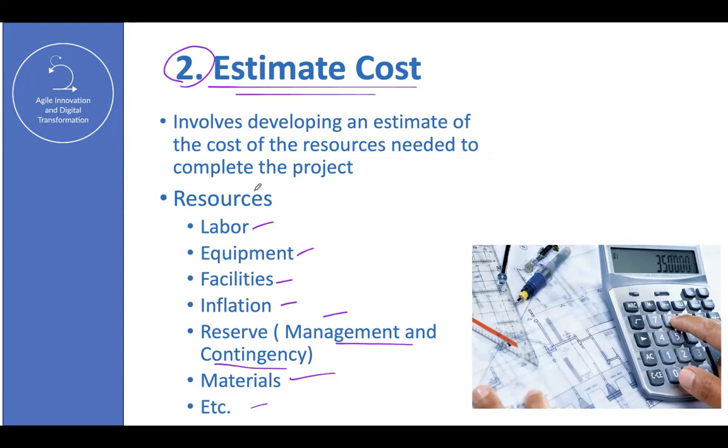This is estimates, approximation. So please do not forget meals, travel, software licenses, subscriptions, what else? Travel, whatever. Just put every single element here in an estimate cost process.